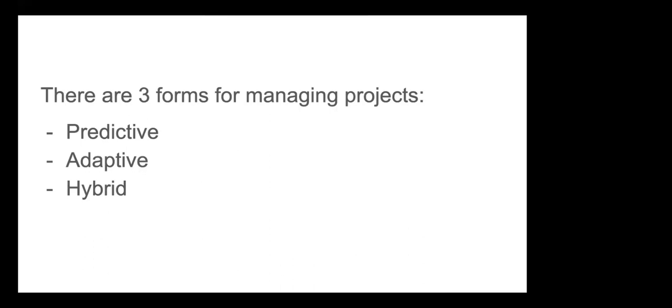Because even though change can happen, it has to go through what we call the change control system, especially when that change is a fundamental change that will affect your key metrics. Maybe something that will affect your schedule, your scope, or your budget. You understand? Those things have been baselined.